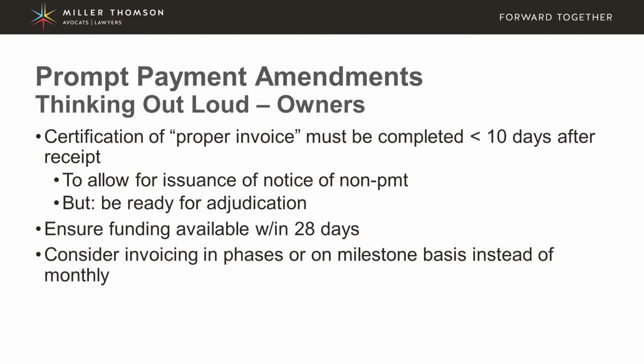Because if the owner intends to object and deliver a notice of non-payment, there has to be sufficient time to do that by day 14. So really, the payment certifier has to be ready to go, ready to review this invoice, and able to advise the owner whether there are portions of this invoice which are improper, which are excessive, which relate to work that has not yet been completed, various reasons that a payment certifier might refuse payment.